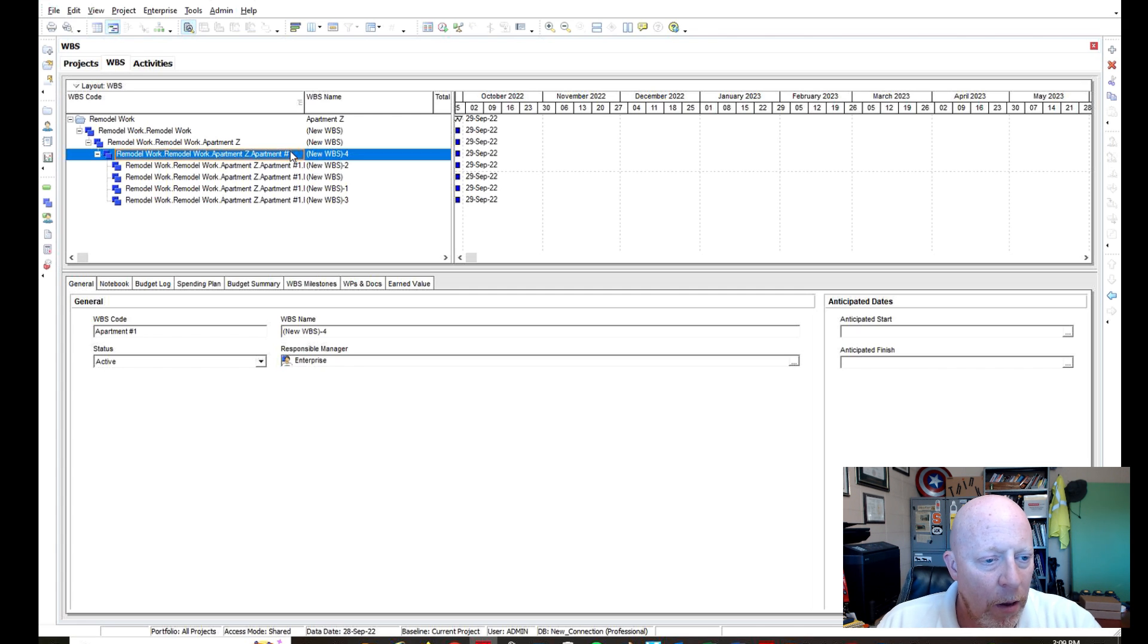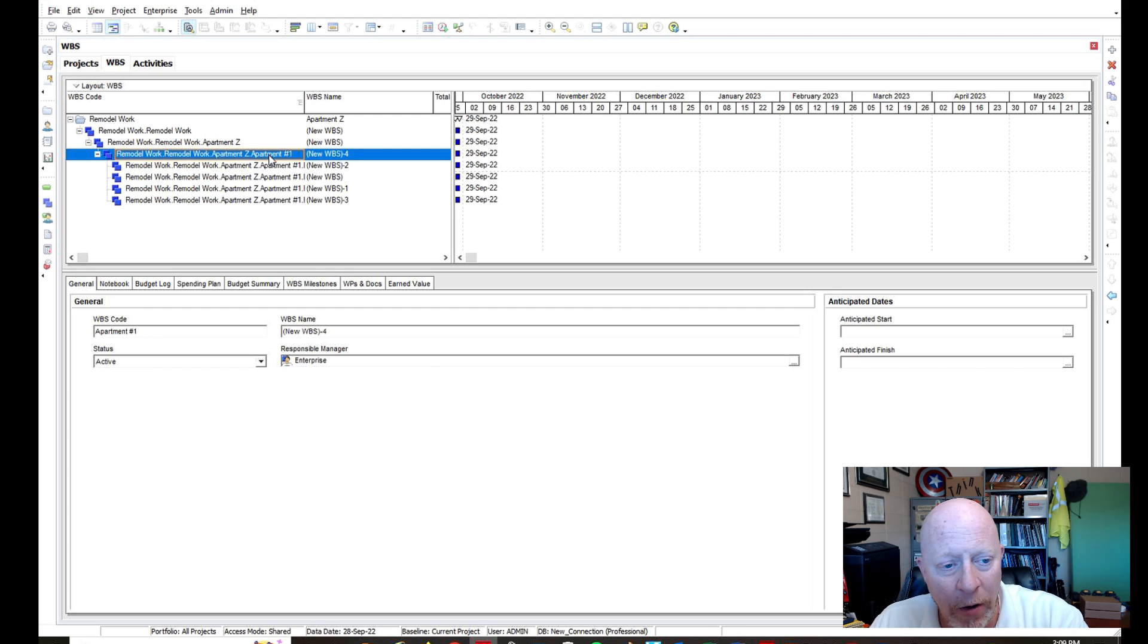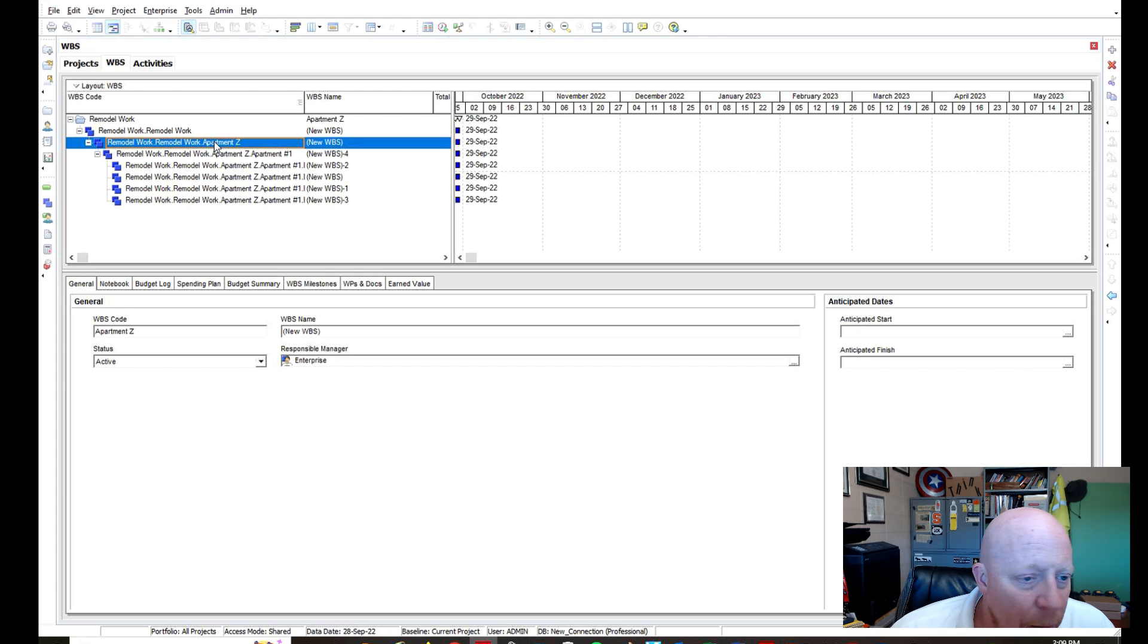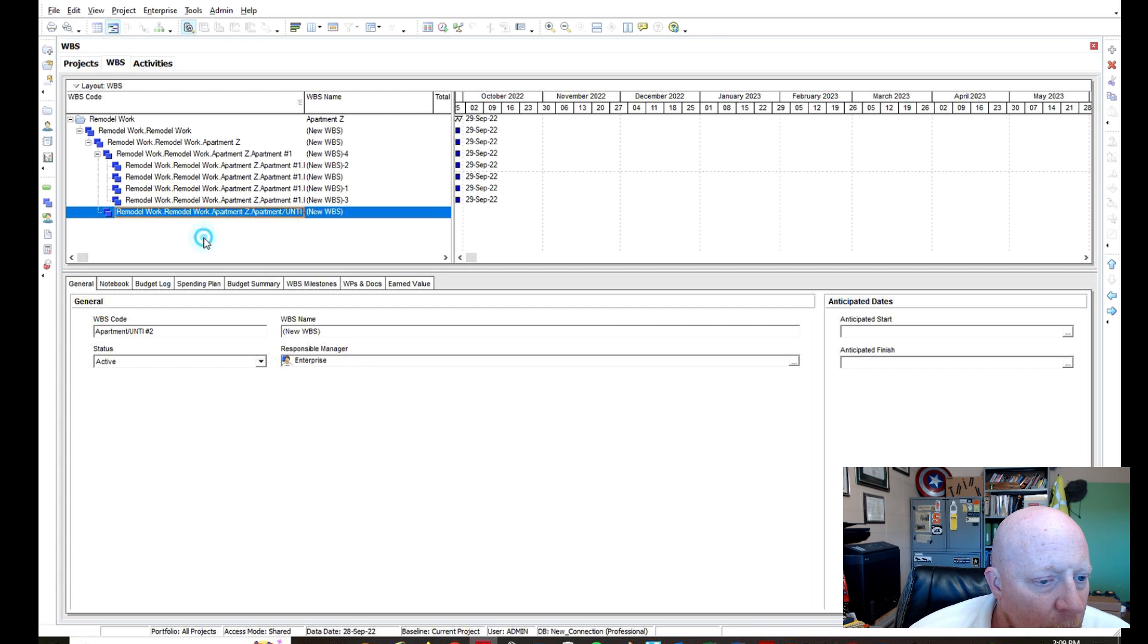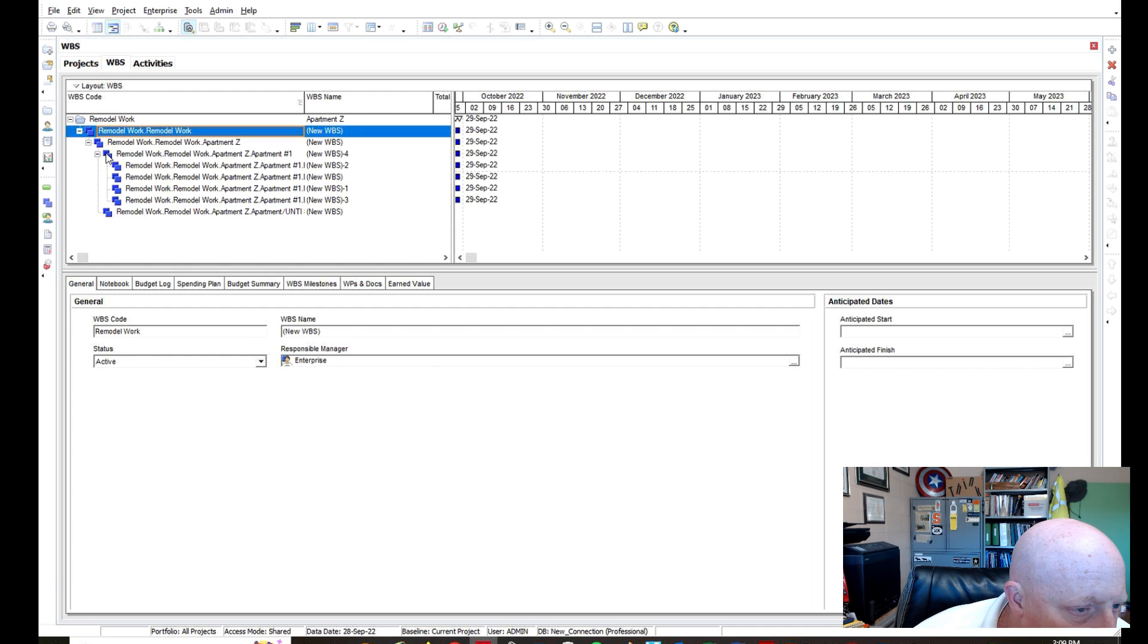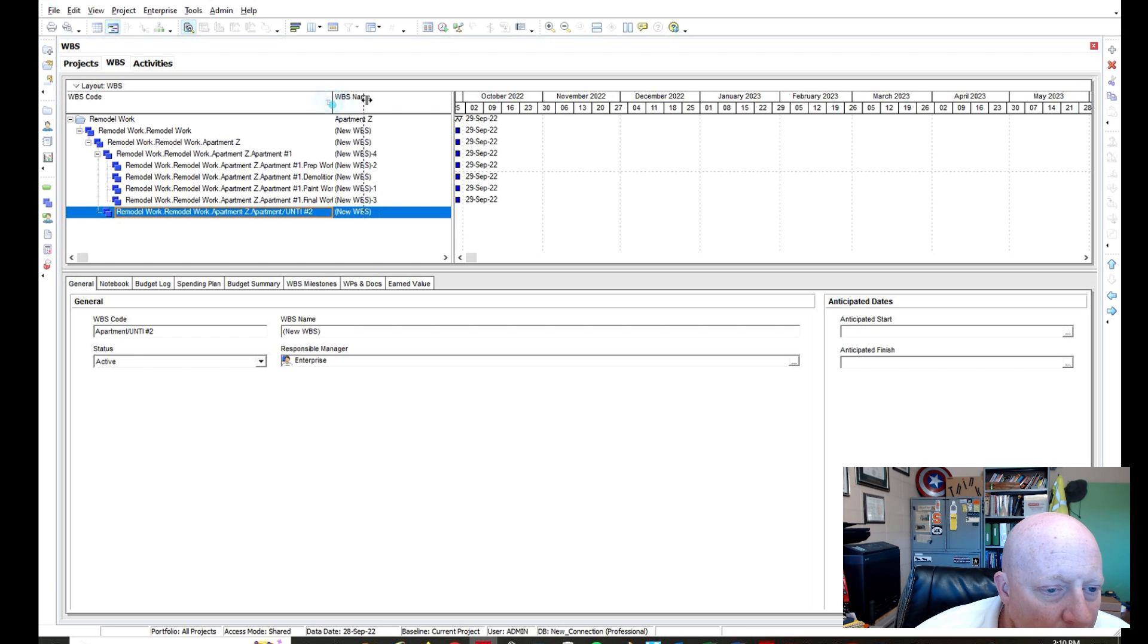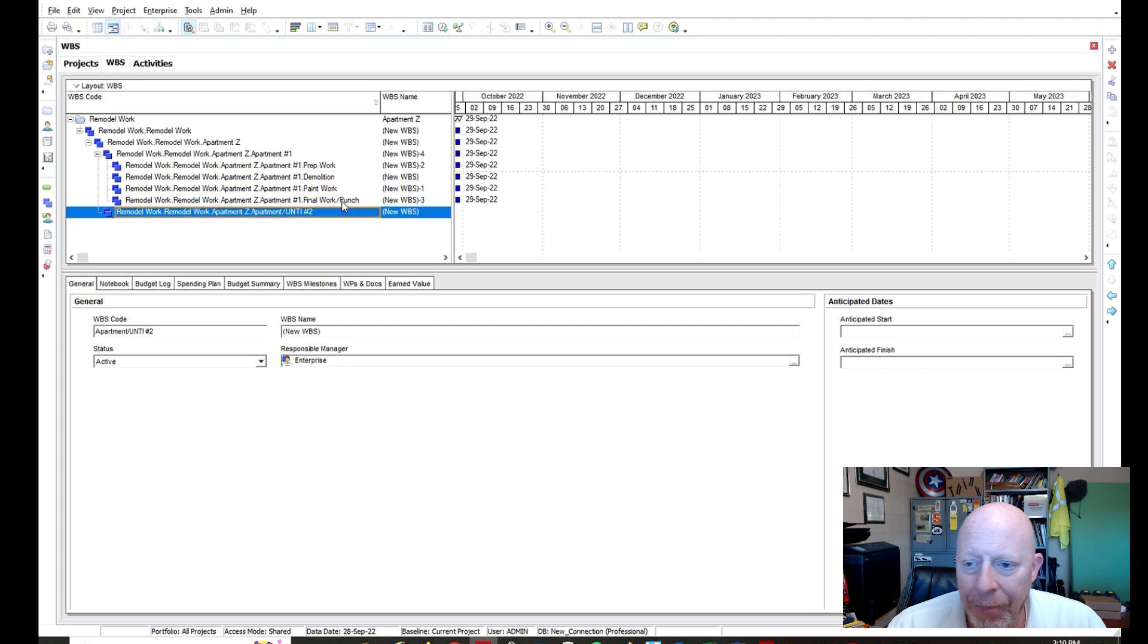Because I've got apartment number two, apartment number three, apartment number four. So I've got all these units. And I need to space those out so that I can put all the different work. So I'm like, here's apartment one, or here's unit one. And then I've got unit two and unit three. And there's different work to go on maybe in each one of them. Or maybe it's all the same. Regardless, I wanted to split that up. Because then I can come down here underneath apartment Z, I can hit a plus. And it'll put it down here. And I'm going to say apartment or unit number two. So now I can do the same thing. So these are in the same plane. So apartment number one, and now apartment number two, or unit two. And then each one of them will have prep work, demo, paint, final work, and punch list. So you can see how I can use this WBS to work to my benefit where I can divide up into two different units. And then each unit has its own work.